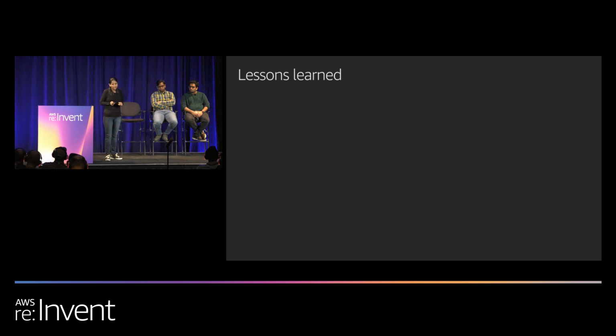Lessons learned. I have been talking about some of the best practices throughout this presentation. I'd like to share a few more key takeaways here. Multiple rounds of test runs. We did exhaustive test runs, and we did it in two ways. One was with the scale of the data, and the other was with the real production data. With the scale of data, we were able to test all the steps, and along with that, we were also able to test the switch to Aurora and the rollback step.